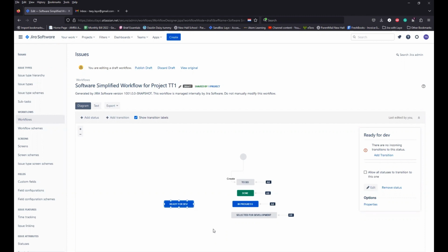I can create a ticket now and then I can move it to done without any checks or validation happening. Whereas if you're having transitions, you cannot go from in progress to done without first of all doing QA testing or without doing your verification, depending on how you're set up or how your team works. Then you would not be able to do that. So in my subsequent videos, I'm going to be walking you through how to do your workflow so that it follows a structured pattern with some restrictions included in it.